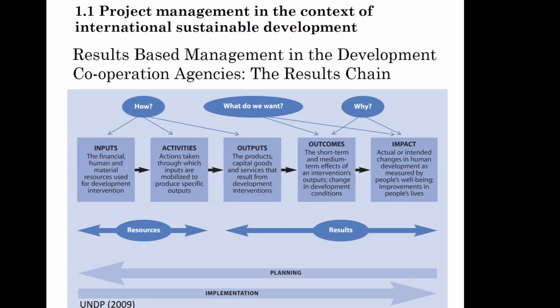With the introduction of results-based management, the way in which one should look at the project was inverted. According to the RBM, one should start with a top-down analysis, first having a clear picture of the results that we want to see achieved in the long term. These are called the impacts or the goals of a project.